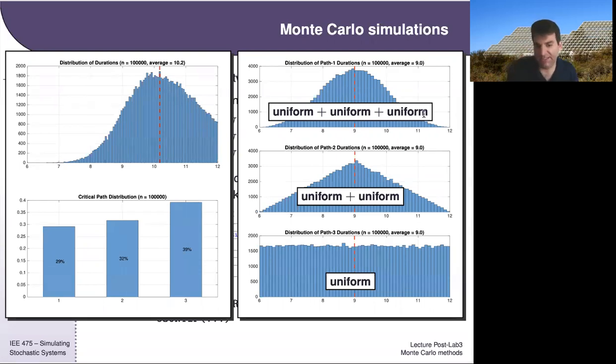And because of this, when you put in parallel a group of activities, even if they have the same average, if one of those parallel branches is the sum of a bunch of activities, it will most likely finish sooner than things that have less summation going on, because the variance will be more compressed with the summation, if you can guarantee that the average across all the branches is the same.